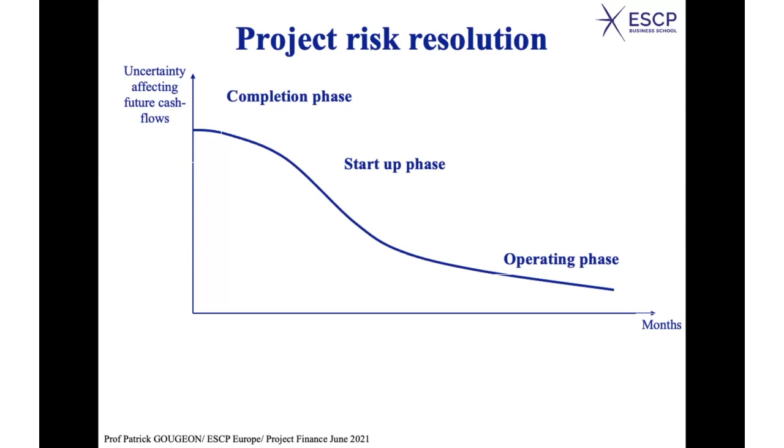The project is completed. The equipments are there. They can be used. Yes, but you have to see whether they work as you expect. Maybe the efficiency of the equipment will not be as high as expected. Maybe your wind turbine, which was expected to provide electricity during 40% of the time, maybe the wind is not as much as you thought, and it will be only 35%, okay? So you will realize this during the startup phase, okay?